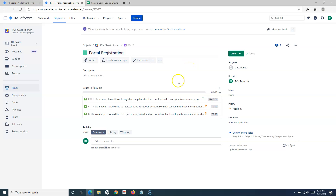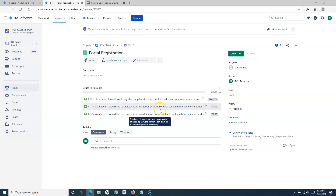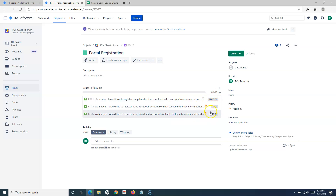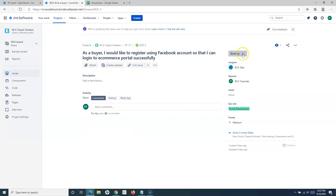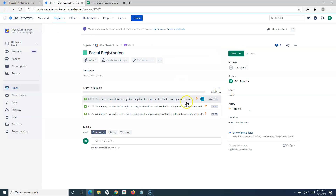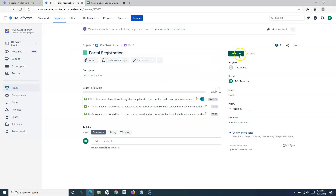But in terms of process, usually whatever user stories are within the epic need to be completed first. For example, this epic has three user stories — one is in the backlog and two are in 'To Do'. Those user stories should be completed before you close the epic.